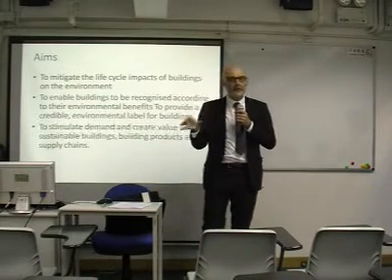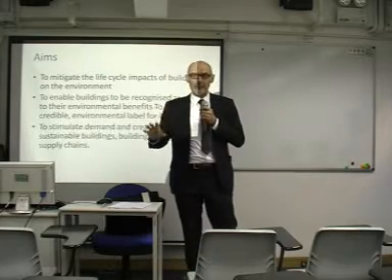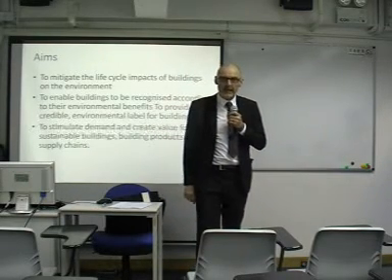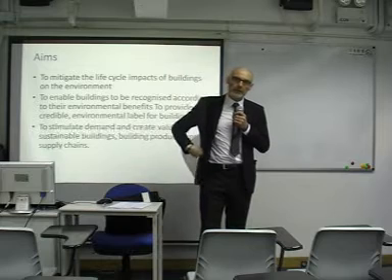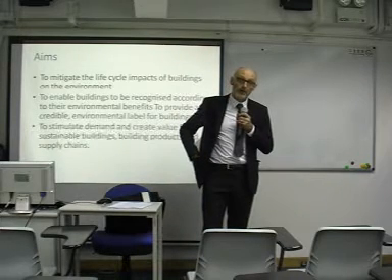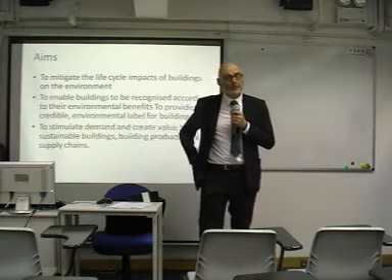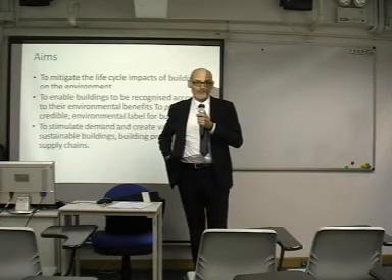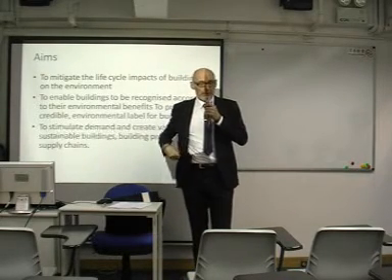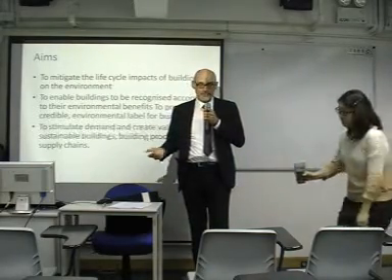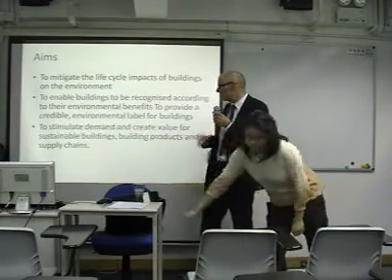They were using combined heat and power, and they were feeding the boilers with biomass. So it's very low carbon. The boilers all failed because the reliable supply wasn't able to be found. So in fact the workable boilers had to be brought in from Northern Europe, from the Netherlands as I remember. So the British made ones didn't work. So you've got to have good manufacturers for these systems in order to meet these objectives. So it's taken some time to do that.